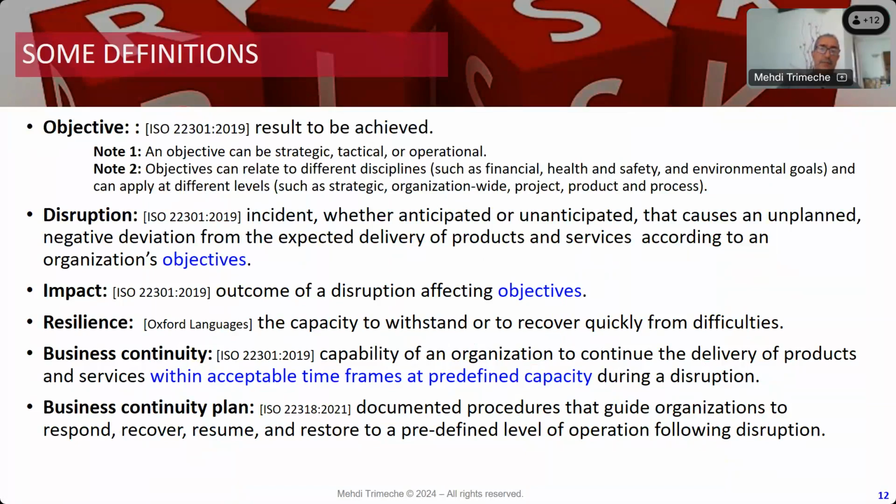For example, for occupational health and safety, through the work breakdown structure, we define the activities for each work. And then for a simple task, we need to do the analysis and identify the dangers and the risks that may cause an incident for the employees.